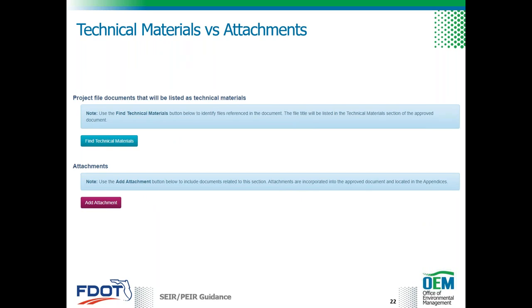Each topic in the form allows you to upload documents as either technical materials or as attachments. Technical materials are documents contained under separate cover, incorporated by reference, referenced in the SEER itself, and included in the project file in SWEPT. This includes technical reports such as a project traffic analysis report, conceptual stage relocation plan, natural resource evaluation, and the preliminary engineering report, as well as technical memorandums. Attachments are included in the appendix and considered part of the SEER document.